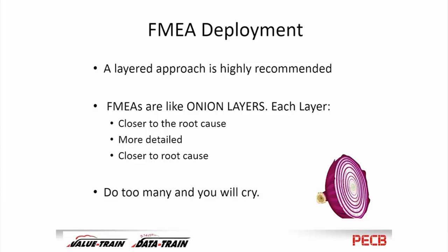And it's made up of subsystems, so we can then look at the risks in the subsystems, and we can keep on going until we're down to the component level. Or if we're dealing with a business process, that's the actions that people take. We can start with the behaviors and the policies of an entire organization, perhaps the IT department, or perhaps the finance department, and then of all the sub-departments that are within it, we can do risk assessment of them. And if we start with the details, it gets too complicated too fast, and people give up.